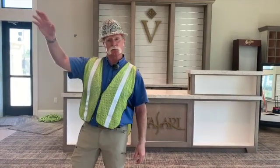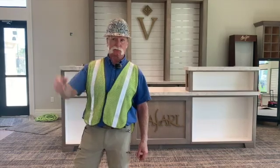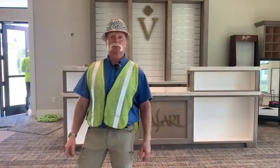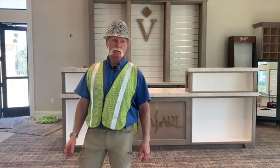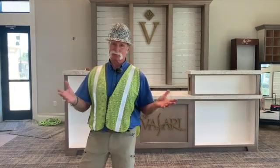We'll try to get the north elevation done first so I can get that dried in. Then we'll do the west elevation. And based on where we are, I think that we should be dried in completely right around Christmas time. So that's maybe not the best news we could have, but it's good news. At least we're going to get dried in.